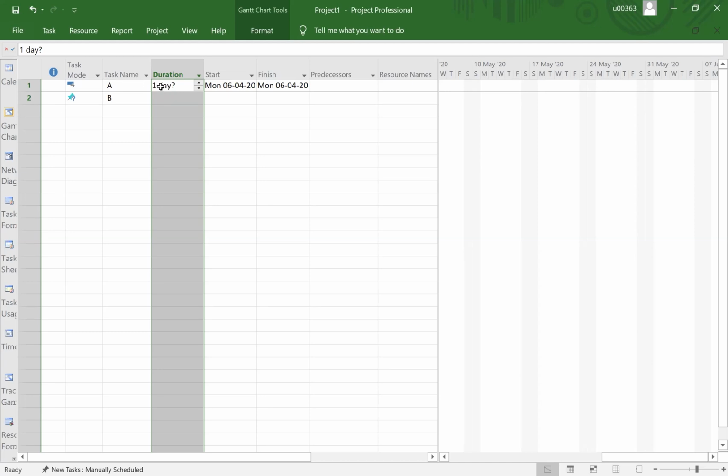You do not want 1 day, let's say 2 days, and then you need to click enter. You see, the question mark is gone already. In scheduling, we do not want that question mark. A question mark indicates things that are not yet certain.